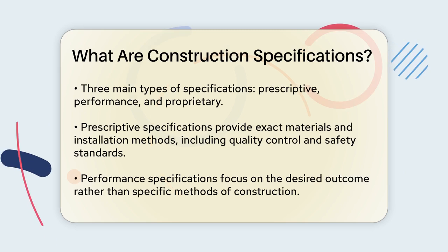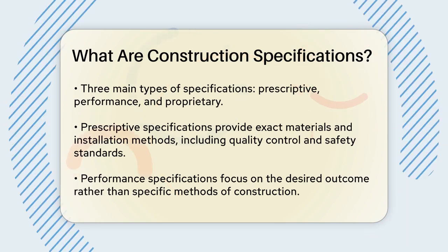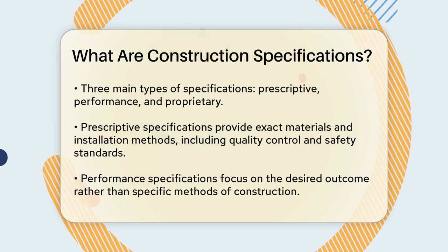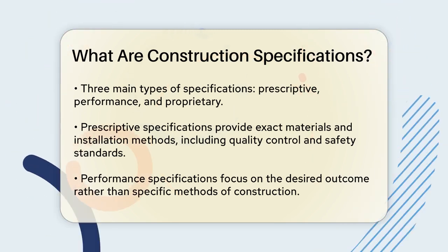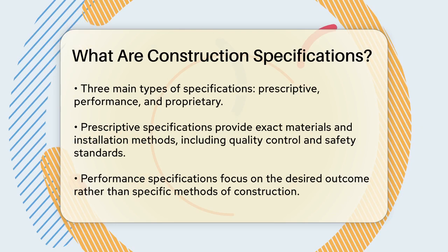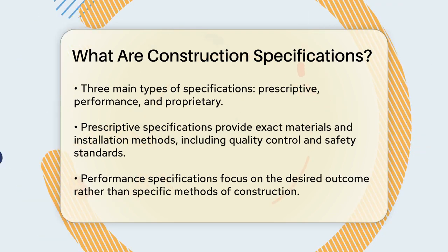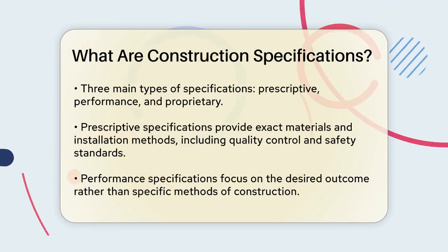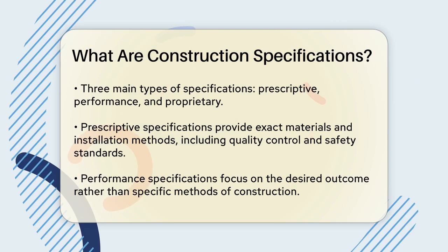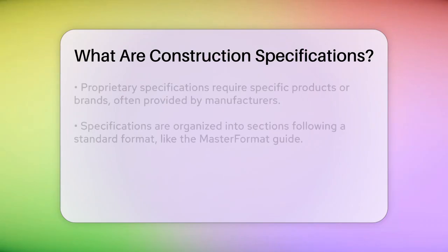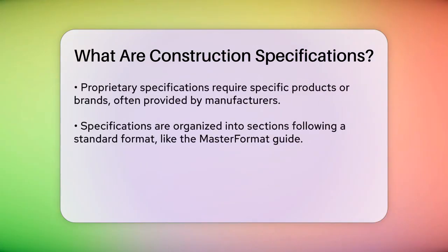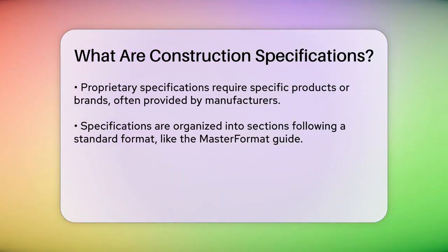Performance specifications, on the other hand, focus on the end result rather than the specific methods. They describe how the final product should function and look, but leave the details of how to achieve that up to the contractor. This type of spec is more about ensuring the project meets certain performance criteria, like acoustic or thermal requirements.